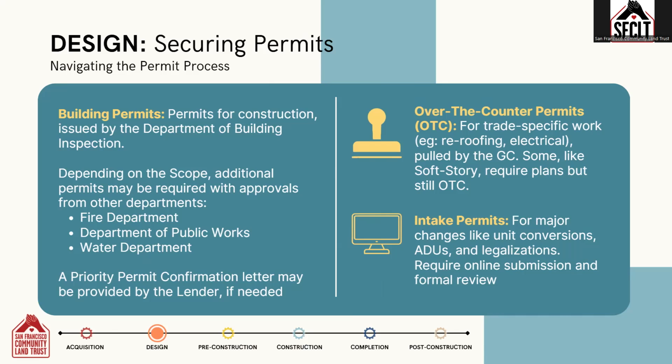Drawings must be submitted for formal review, and this process could take weeks, most likely months, for the review to be completed. This is where that priority letter is really important. Permitting requirements vary greatly by location, so your construction manager and any hired consultants should be familiar with the local permitting process and the local code requirements.